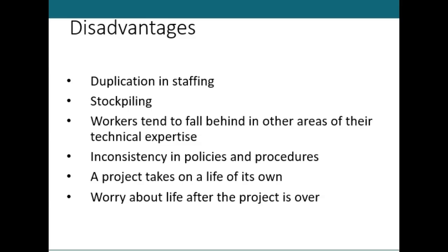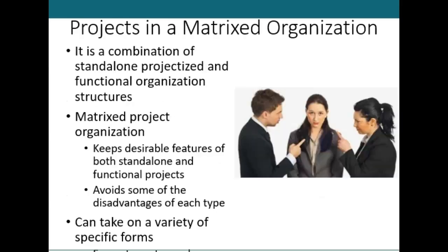It duplicates some staff. So each project manager will have a procurement manager on there, somebody that can commit for the company and sign contracts, right? Which is generally not a project manager authority. So you will have to duplicate that over and over, right? The project can sometimes take a life of its own in a projectized organization. That's why it's nice to have an active PMO to oversee and support you.